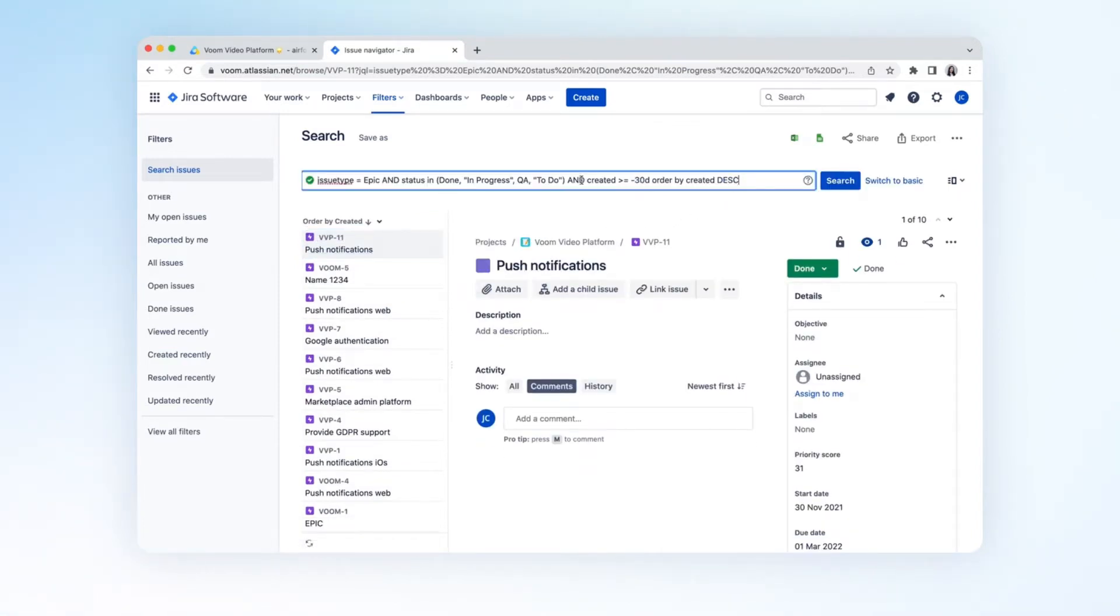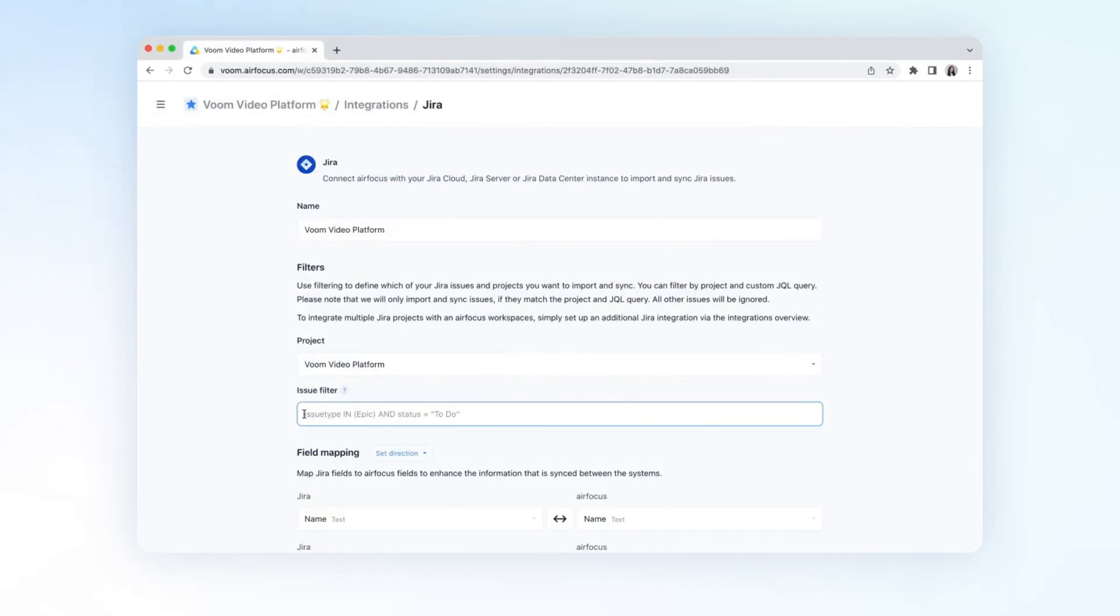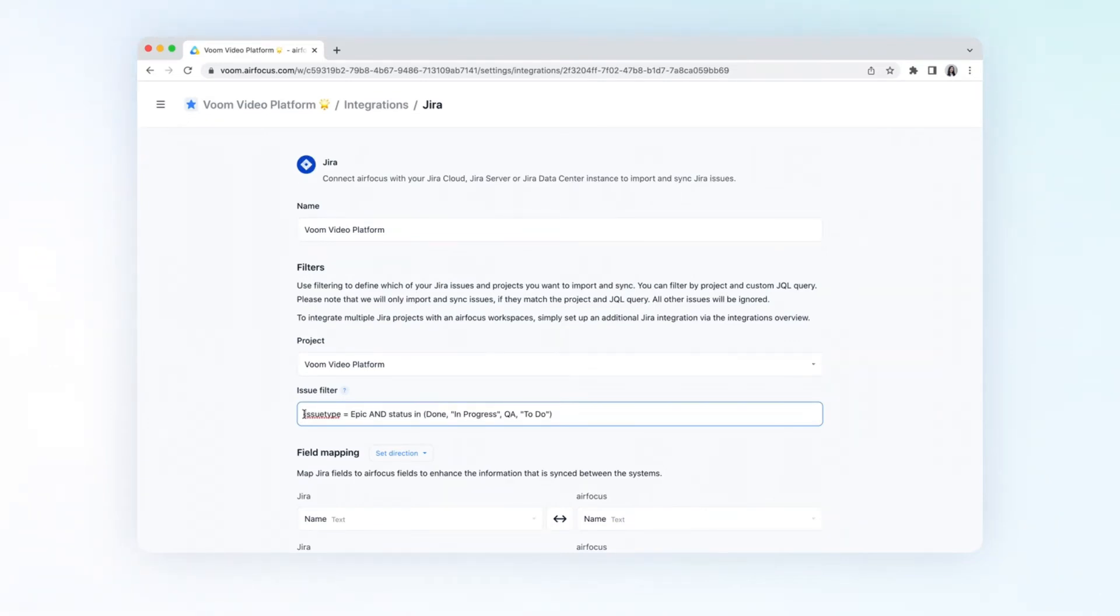There it is. Copy the JQL and paste it to AirFocus. Please note that we will only import and sync issues that match the JQL query. All other issues will be ignored.